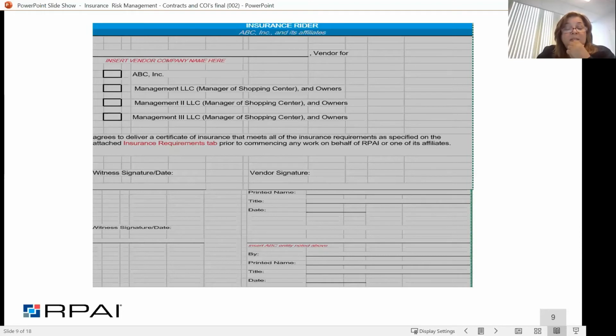And then this is kind of a win-win for both the contractor and for us, because if I went out and required them to give me a standalone additional insured endorsement that didn't have the written requirement agreement, most likely their insurance company is going to charge them a fee for that. The reason that they write a blanket additional insured endorsement as required is because it's easier for them to manage, right? They understand the type of work that this insured is going to do.